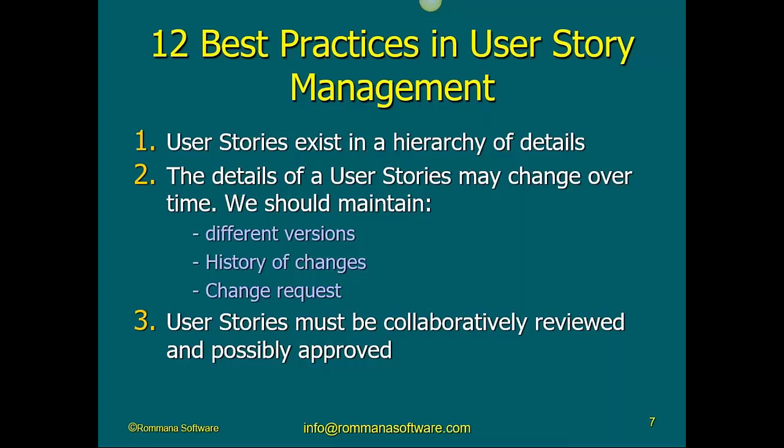If we don't do this, then user stories are not going to provide any context, because you're going to have a small user story that says, as a customer, I want to receive my refund on the credit card. You take that user story by itself, you don't know what it is related to. But you will understand the context if that user story is a sub-user story of another user story, okay?